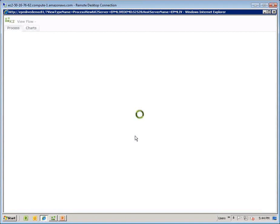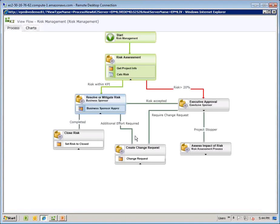As he was going through the process, he selected who he wanted to assign that risk to. Again, K2 picked up that form field, determined that that's who he should assign it to, and assigned it to that risk. Additionally, as part of that risk assessment process, we did a calculation of that risk. Based on different KPIs that you may have, or different strategies and rules that you might have inside of your processes and how you want to manage risk, you can set up those KPIs. So we calculated a risk within that KPI and determined that that risk was less than 20% of that KPI. So we just sent it to the business sponsor for approval.